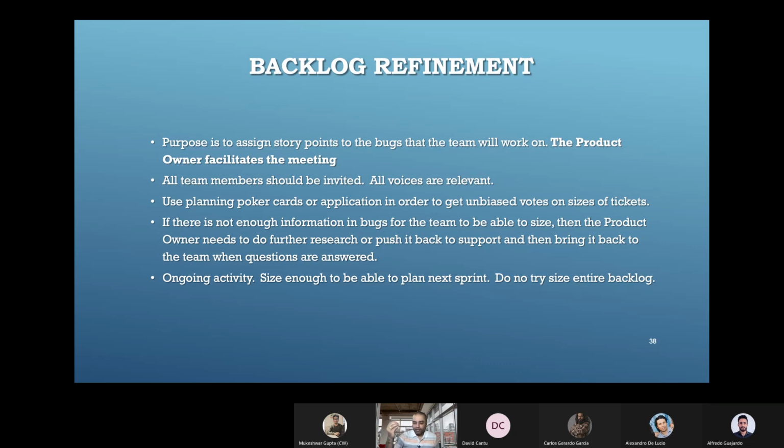And how will things work? If the team velocity is, say suppose, 46, the product owner would also be knowing, in my sprint 16, if we are going to start after 2, 3, 4 or 5 days, whenever we are going to start, do we have sufficient groomed items on the upcoming sprint backlog so that we can start our sprint without any issue.